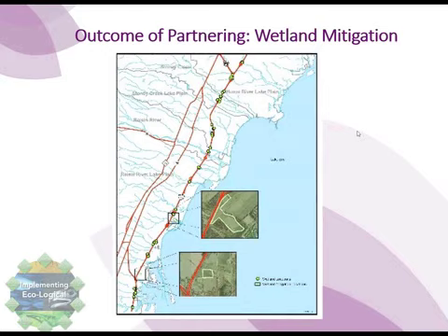Due to the SHARP 2 partnering, MDOT learned that the MDNR, our Michigan Department of Natural Resources, was purchasing farmland to the east of I-75 to add to Erie State Game Area. The MDNR had planned to restore the farmland to coastal wetland, but did not have the funding to perform the restoration. MDOT was able to supply $900,000 in funds to the MDNR for the wetland restoration, and we gained the benefit of having the MDNR tend to the long-term management of the sites.